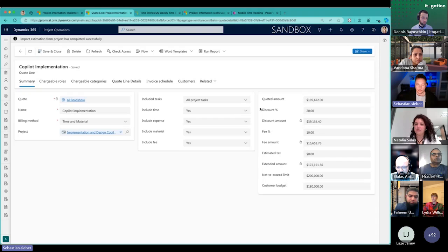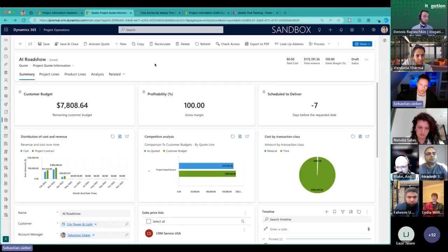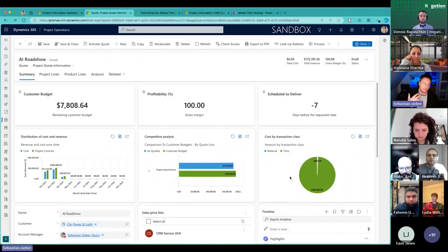When I go back to my quote line, I can see that I have a fee on that, I have a discount on that, and I have a total amount, which is just below my not-to-exceed limit, and still based on the customer budget. So everything is fine. I can go back to my quote, and I should then see some refreshed values here. I can see how the distribution of the cost looks, what the customer budget is, what will be quoted, and move on from my sales perspective with a much better detailed quote into the race with the customer.